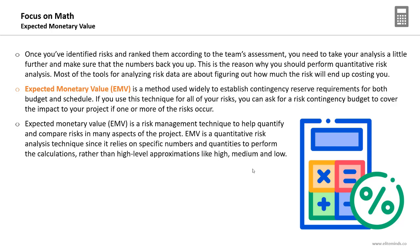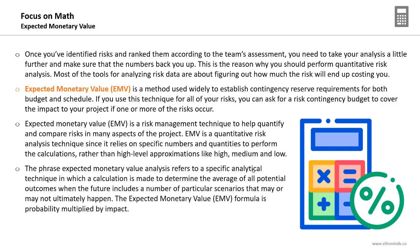The key difference between EMV and subjective analysis is that in EMV you rely on specific numbers, not high-level approximations like 'very high,' 'medium,' or 'low.' The phrase 'Expected Monetary Value analysis' refers to a specific analytical technique where a calculation determines the average of all potential outcomes when the future includes scenarios that may or may not happen. The formula is simply: probability (in percentage) multiplied by the impact, which is usually a budget or schedule value.